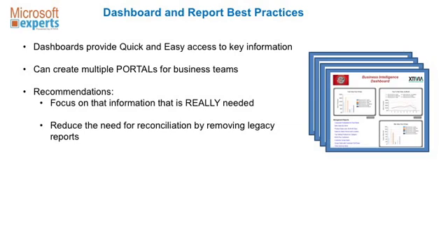So a management technique for the project is to get together with those users and the business community and explain to them the rules. Hopefully they were involved in creating them. And as soon as you can, remove the legacy reports and decommission them, and don't give them the option of comparing them as soon as you can establish a new trusted source of information.